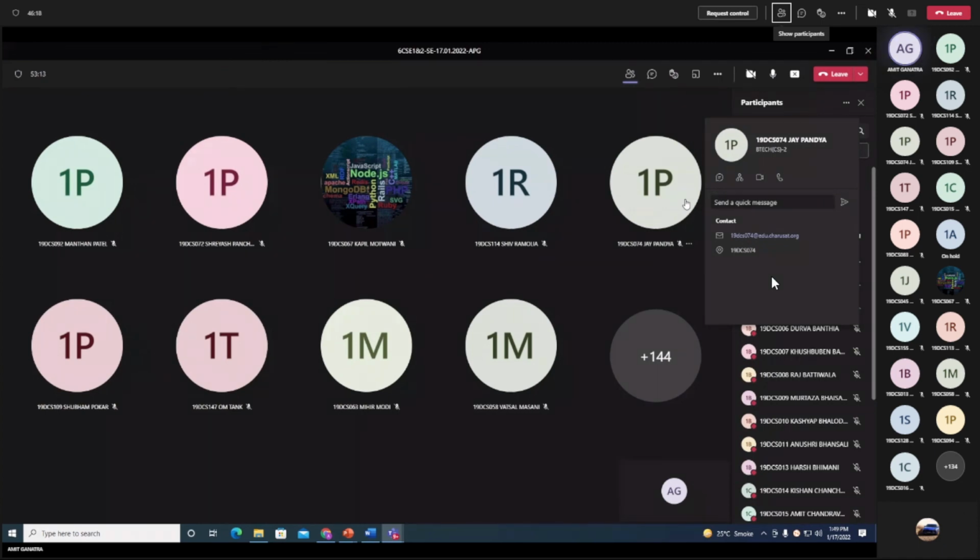It's all about equations. What you have to remember is to put in the values, right? And you have to calculate the cost. You have to calculate the efforts. So once you get the total number of function points, per function point you can define 1500, 2000 and then multiply. This is how you can get the overall cost of the software. So either you can use COCOMO for estimating the cost of the software, or you can use function point, right? Industry standard is function point.